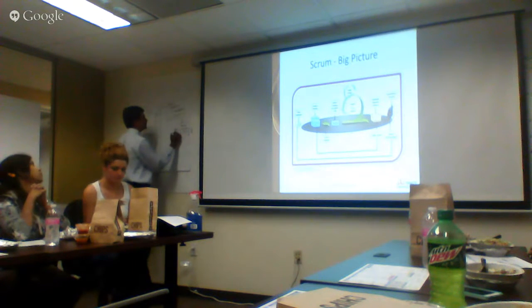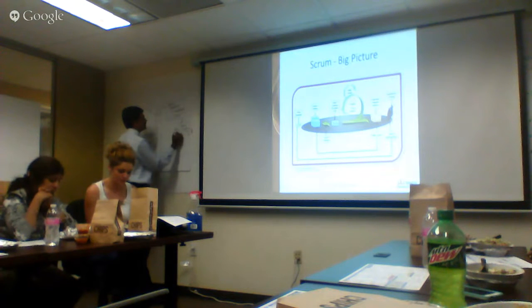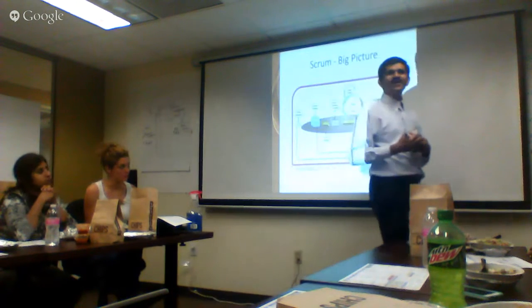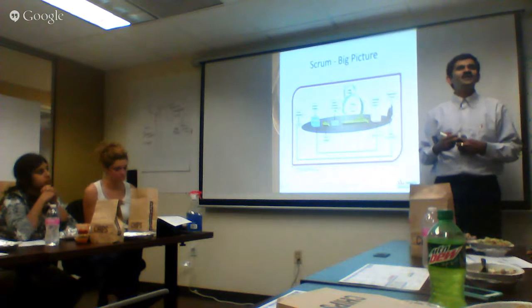All the team huddle together and then discuss three things: what I have done yesterday, what I'm going to do today, and what the impediments are on my way.